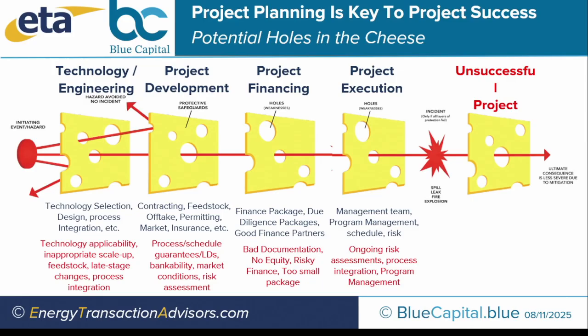We talk about market risk, we talk about technology risk. As you're building the project, and especially during startup and commissioning, so many new risks pop up, and it's a very frantic time. And that's when you really need to be very diligent about still evaluating, taking the time to evaluate those risks and document them so that you don't forget that, oh, we put this Band-Aid on the project to get the test done, and then during operations, that Band-Aid falls off.